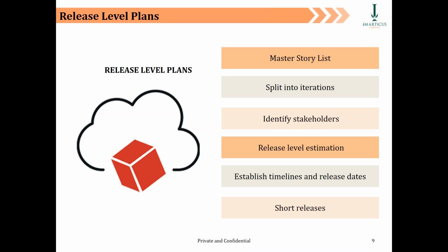Because in sprint 1, I'm releasing code or changes which I've done for the sales order module. So I should inform the stakeholders sitting in sales order management, right? Similarly, I have to ensure that at the time of release, the estimations are part of my sprint cycle, because that inclusion of effort into the total effort will give me an overall timeline and release date.